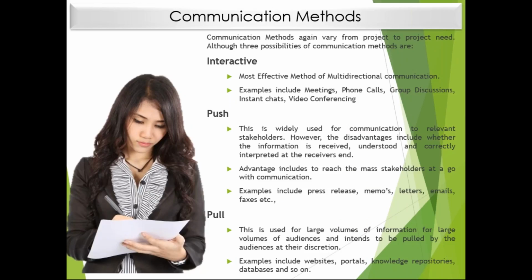Push is if I record all my content, and you have to just go through that content. For example, every day I'm sharing an email with the recording of this particular session. I send out an email to you. That's the push method, where I'm pushing the information to you and you're supposed to listen to it. Pull is I upload the information into a portal. Whenever there's a requirement, you go into that portal and pull the information yourself.